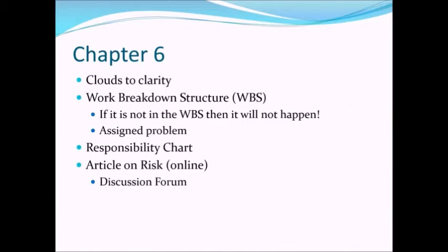And the concept is that if the activity is not identified in the work breakdown structure, so we forget that we needed to order the tent for our event, then it won't be in the budget, it won't be in the schedule, and it won't get done, and so our project will fail. So the work breakdown structure, converting those concepts into actual activities, huge step in the life of a project, and we're going to try that out with the assigned problem.